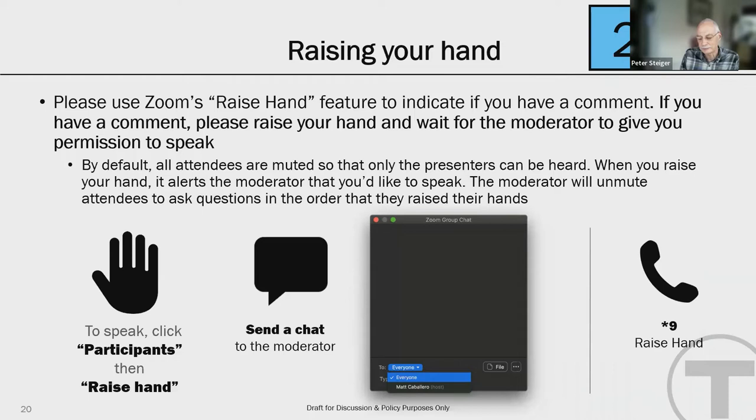Thank you very much. As we mentioned, there are two priorities within the CIP. The first is the reliability and the modernization of the existing system, followed after by the expansion. As we've mentioned, the current planning on the E-Branch project in the CIP continues to focus on improving the safety and accessibility of the corridor, but we are really appreciative for everyone's comments today and the ongoing support. Just to circle back on the previous question, I do want to verify that the E-Branch accessibility project in the CIP is programmed for $85.9 million total, with $85.7 million in the five-year window.